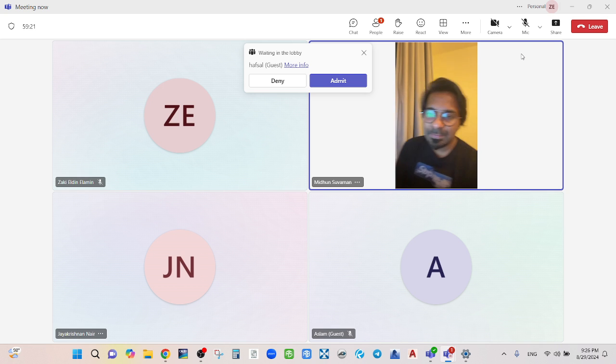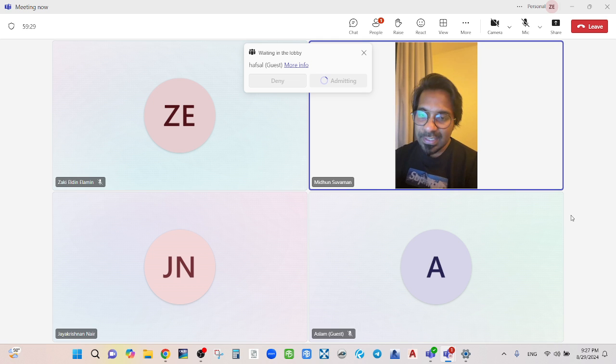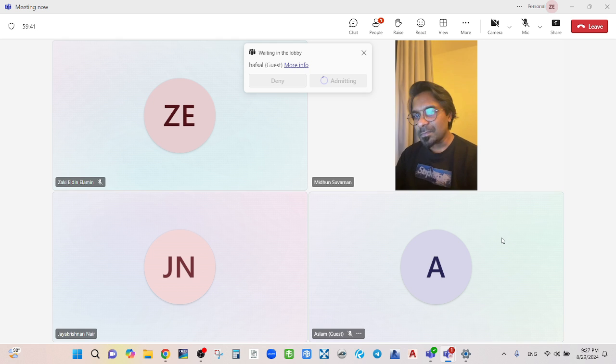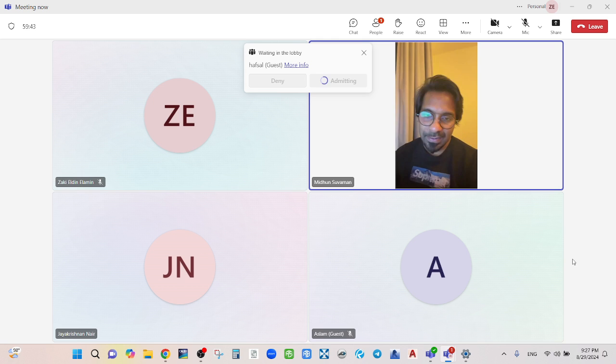If you're giving some money, there should be some assurance also. So Jayesh is giving me 10% of the money as advance payment. He will ask me, Mithun, I can give you this money, and I know you have to start initial mobilization and do this ABCD work, but give me a guarantee from the bank. If you're not repaying me, I will tell the bank to pay me. Same concept: debtor, creditor, and surety.